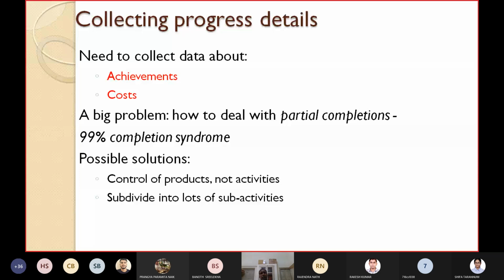The drawback of the standard accounting system is that it does not tell the project manager what has been produced, or whether the tasks are on schedule, that is, whether there is any schedule slippage.